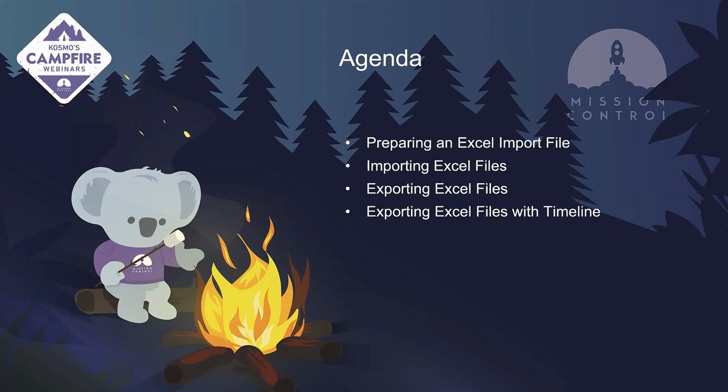This is the Excel import export feature. It allows you to build up your project plan within an Excel file. You can build out all the way from a portfolio all the way to checklist items: portfolio, program, project, phase, milestone, action, checklist item. All of those records, you can build out directly within an Excel file, and assign the levels that each one should go to, which is what we call the work breakdown structure. That can be used to import it into the system. There are also some standard values that you can input, like the schedule, the status, who the action owner is, or the owner for that relevant level. We'll have a look at that in more detail once we get to the demo.